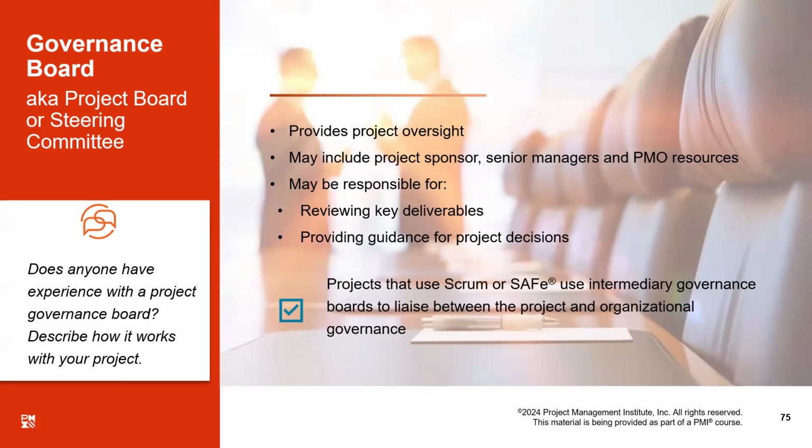Naturally, the sponsor of the project is part of the governance board, but there are other key stakeholders who help make decisions about governance issues or project issues. The matters which are escalated to them, like risks and issues, they are the people who decide the fate of those. And if there is any change request, especially in a predictive project, the fate of that change request is also decided by them.